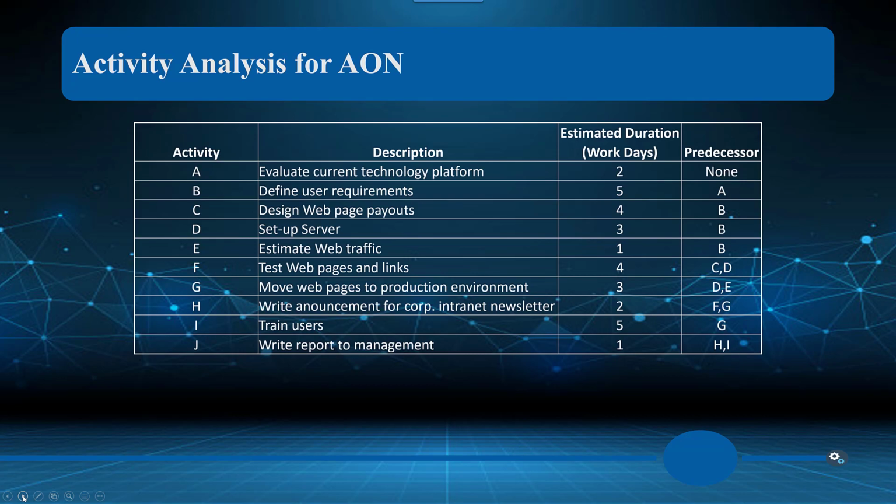Okay. Now keep in mind, as we look at these Gantt charts, we are looking at work weeks. So consequently, how we're doing in that week is based on work days, 5 work days, 40 work hours. Most of the time we use work days or portions of work days. So if we know it's going to take half a day, we would just put 0.5.